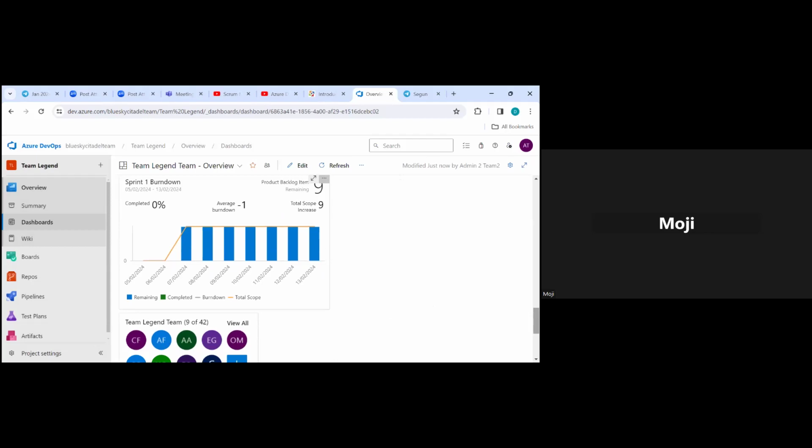So you can see that it didn't pick Monday, it didn't pick Tuesday. So even if you did your sprint planning on Tuesday, your stories were not moved to committed until Wednesday. And that's why Wednesday is when it's showing the bar. That's what I was talking about when we were doing it, that it works with real time. So there is no way you can go back and, I don't want to use the word manipulate, say that even though we didn't start on Monday, I'm going to configure it so that it looks as if we started then. It won't work because it's a real time chart.